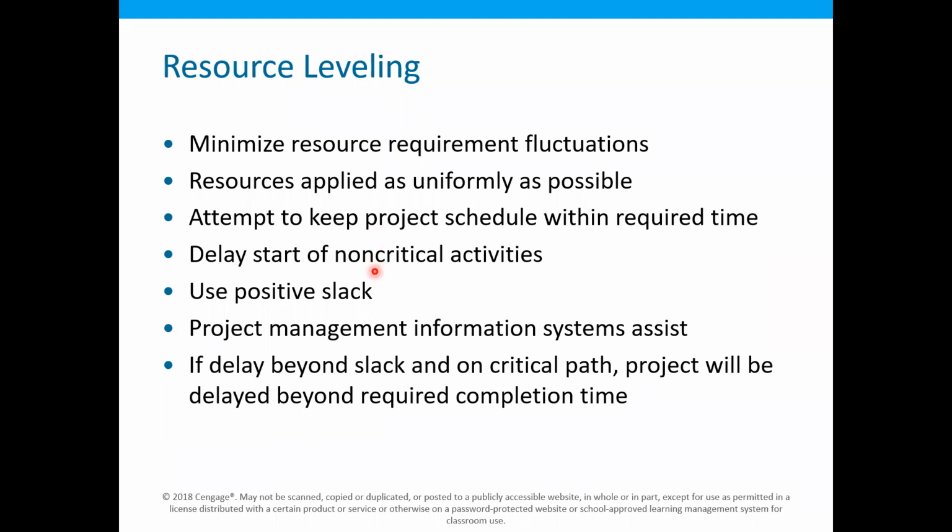Delay the start of the non-critical activities. So this is achieved by delaying the start of the non-critical activities. This is where the use of the slack comes into the picture. Not only the critical activities are important, but the non-critical activities are also important, because we can use the non-critical activities for resource leveling. And of course, use the positive slack. So for this purpose, the positive slack available in certain activities is to be used.